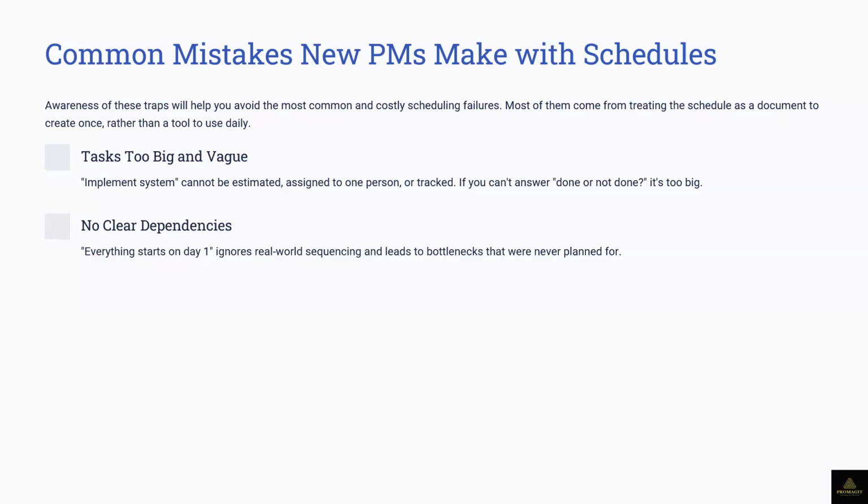That's one of the things that scheduling does, because the waterfall approach will tell you, this one finishes, this one starts, this one finishes, this one starts. But really, things don't have to finish before another one starts. You understand? There are certain activities that can run in parallel. There are certain activities that, once this one gets to the middle, this one can start. Even though technically we know that this one has to finish, you know there are certain things I can start doing. I can start preparing. I don't want to wait